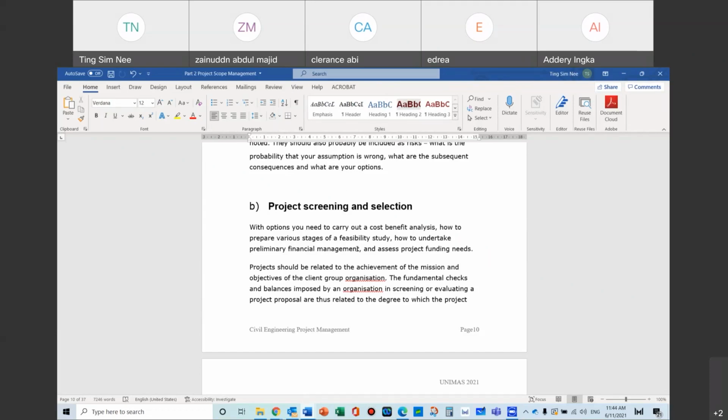And again, you answer this question in the beginning, in the scope, in the definition, initiation bit with the issue. Is it possible? Is it viable? Is it worth it? Okay. Is it possible? Means that is there anything that will stop the project, like non-economic issue, non-monetary issue? Viable? Okay, viable means that do you have the money to do it? Number three, worth it? Maybe there are better things that you can do with the money. Yeah, those are the three questions that you can answer. So basically, in the initial stage, you already answered that. That is whereby you have your project charter.